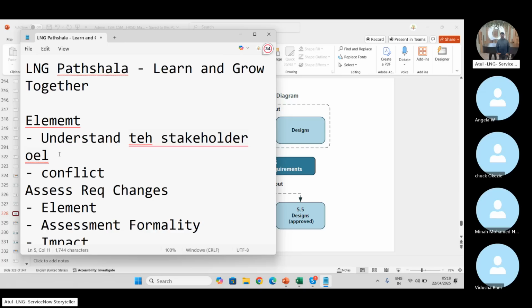See, we are not the business. We are just a business analyst. And we can say if there's a conflict, let's bring both parties to a table and get it sorted out. I can bring change also on the 7th of May go live. But in that case, change needs to reduce these two requirements. Or reduce one requirement from the incident so that I can accommodate change requirements as well. Conflicts and issue management.